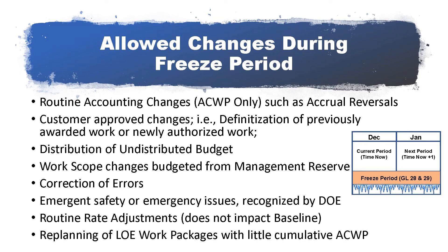Level of Effort, or LOE, work packages earn their value, or BCWP, simply by the passage of time. Therefore, the reporting of BCWP may not necessarily mean that the work in the LOE work package has actually started. The only measure of whether an LOE work package has begun is the reporting of ACWP. In cases where an LOE work package has cumulative BCWS and BCWP reported but very little or zero reported ACWP, it is permissible to re-plan that work package in the freeze period.